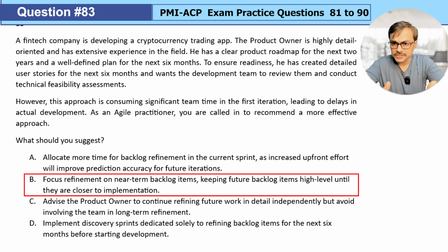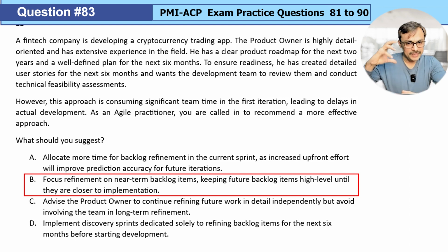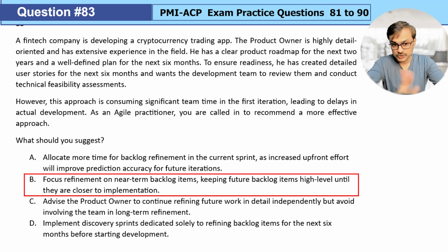Looks great. Yeah. Option B is making sure that we are maintaining a deep backlog, detailed appropriately, emergent, estimated, and prioritized. So the backlog should be emerging. Yeah, that's the essence coming out of option B. Looks good.